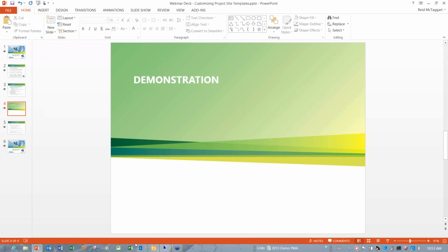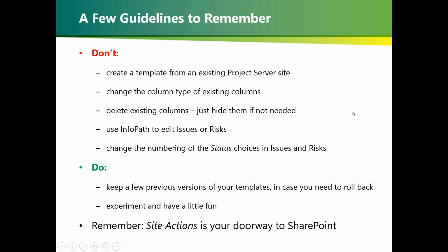So back to the slideshow here, and we just have one little slide to go. Here's a few do's and don'ts, just to refresh ourselves. Creating a template from an existing project server site is not a good idea. An existing site that somebody else created is already associated with that particular project, and if you try to create a new template from it, it won't work. It won't be associated with any new project that's created.